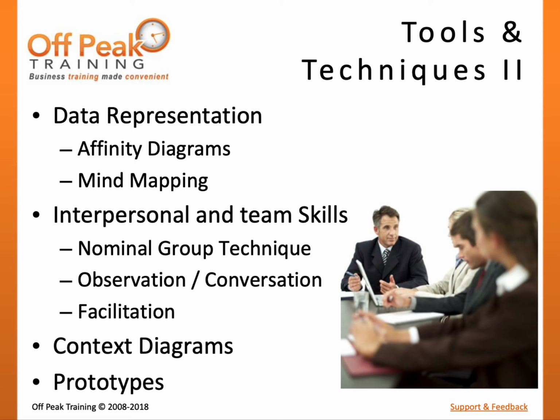Context diagrams can be used to visually display processes or business systems to help understand component integration and workflows. This is similar to flowcharts, which will be introduced later in this course. Lastly, prototypes can be created and shared with stakeholders to generate feedback based on tangible models of the final product. Feedback may spawn more detailed requirements from stakeholders.